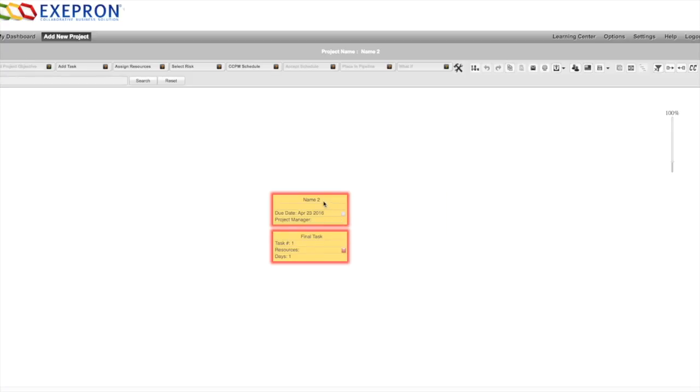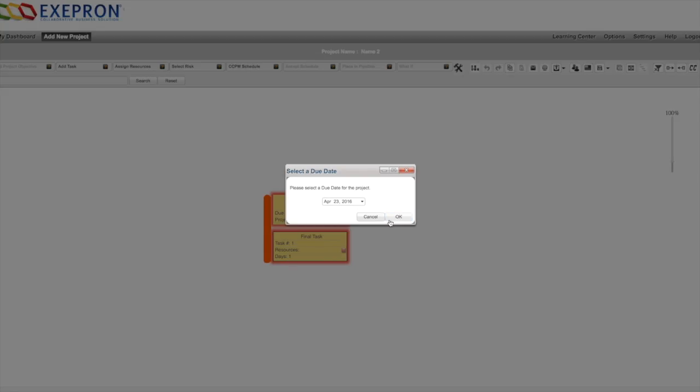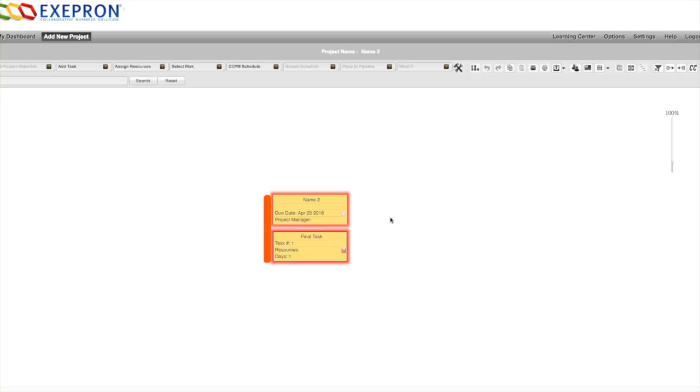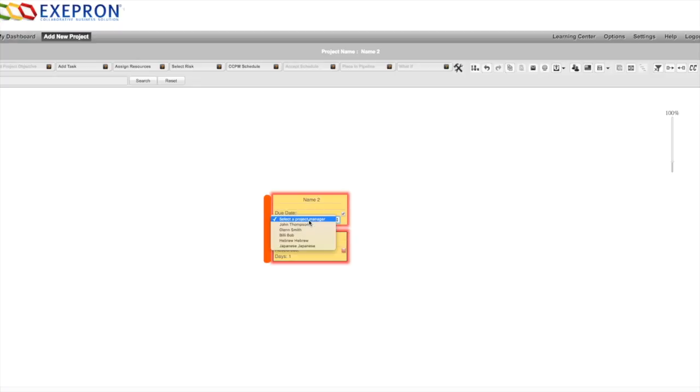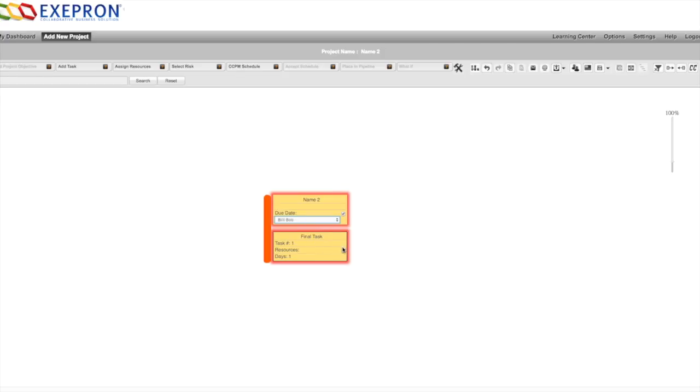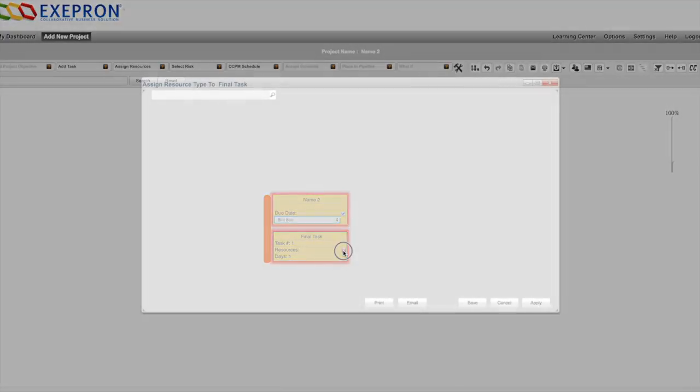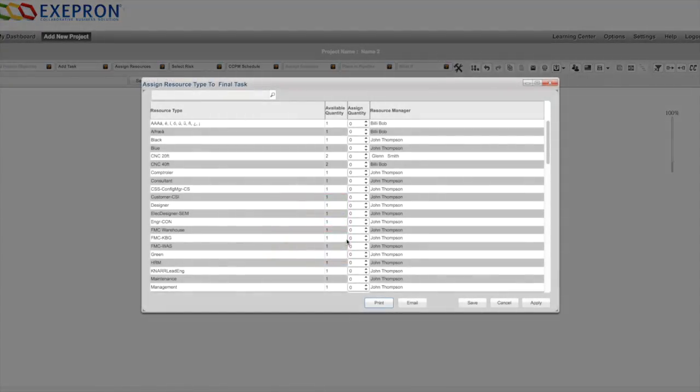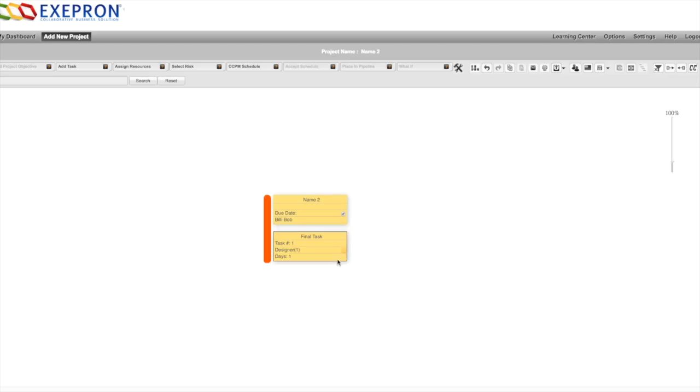Give your project a name. You can choose a date or collect ASAP as soon as possible. Your project needs a manager and your project needs resources. On the final task we'll add resource types. We'll leave it at one day duration, though I could change that.